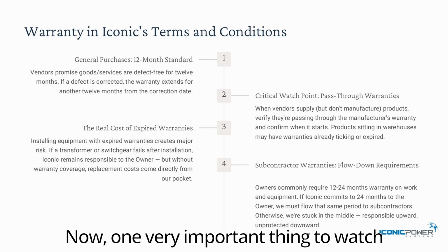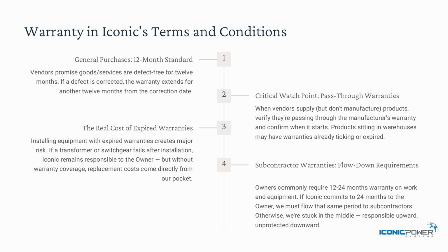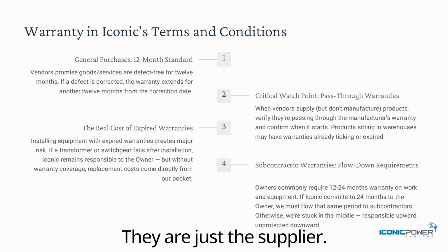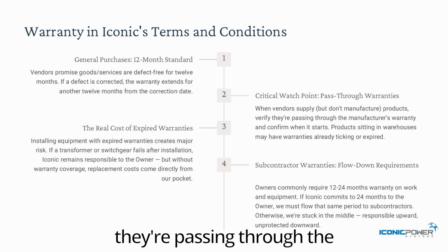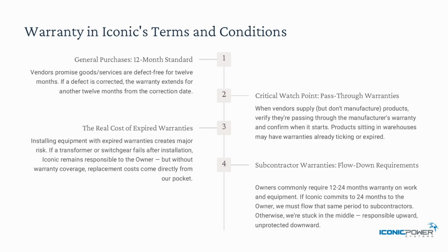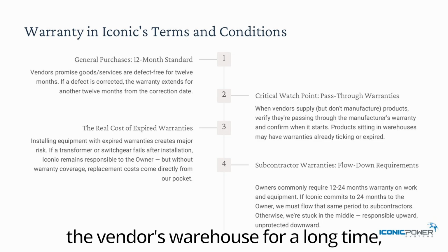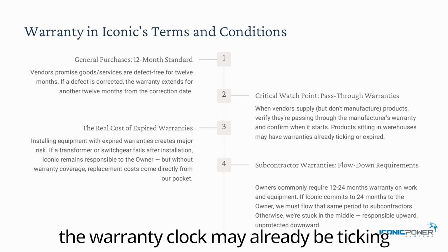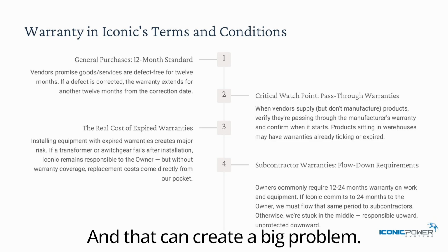Now, one very important thing to watch for in general purchases: sometimes the vendor is not the manufacturer, they're just the supplier. In those cases, we need to make sure they're passing through the manufacturer's warranty and clearly telling us what the warranty is and when it starts. Why does this matter? Because if a product has been sitting in the vendor's warehouse for a long time, the warranty clock may already be ticking, or worse, almost finished. And that can create a big problem.